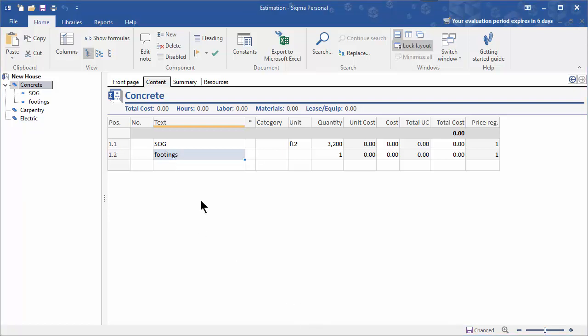In this way you add the components and sub components and sub sub components until you've built your estimate up to reflect all of the work, all of the resources that you're going to need to complete the job.